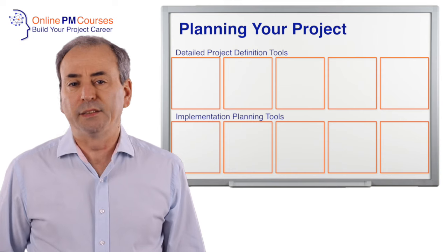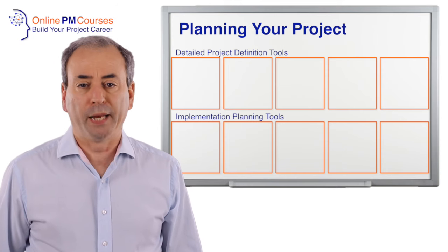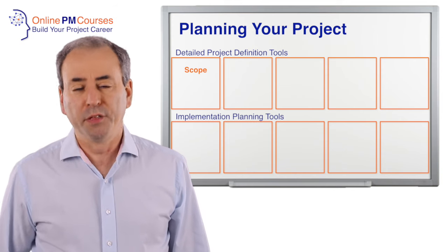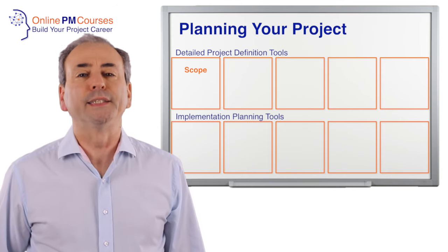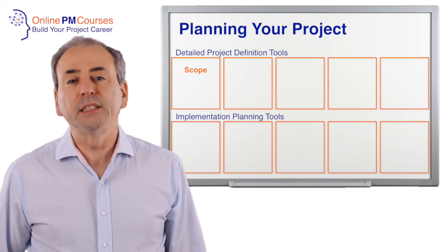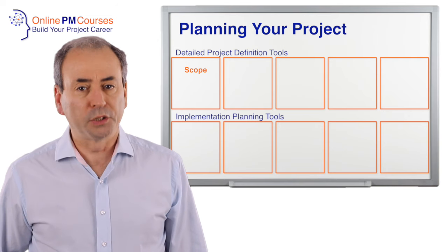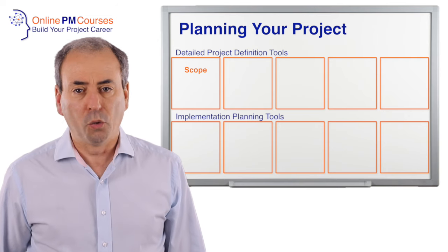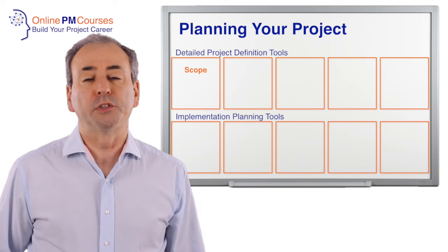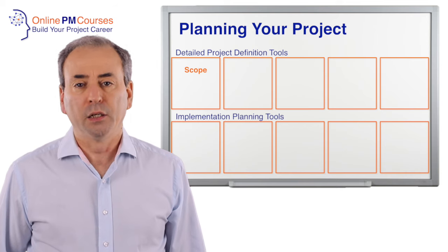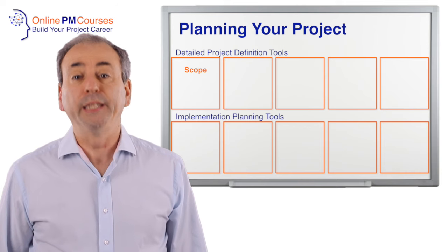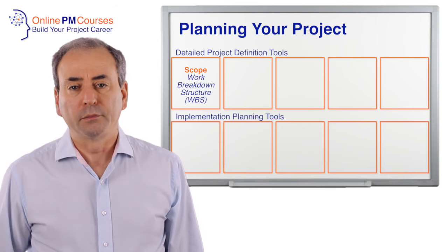The first thing that needs to go into your plan is the scope of your project — the things that you're going to need to do. This sets out all the tasks or activities, and the best tool to use to create your scope plan is a work breakdown structure.